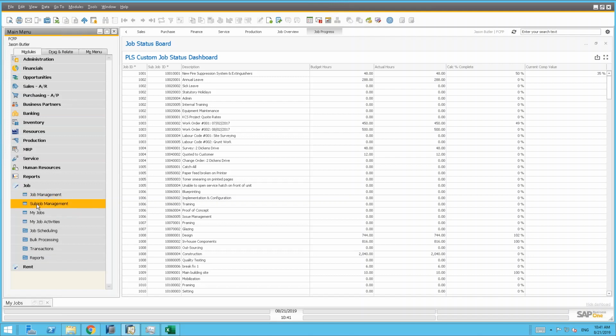So when you're putting estimate lines into a job, that quote that we just uploaded into a job, there was actually a job number created and one sub-job automatically. And the quote lines go into the sub-job. They're all rolled up into the job. So if you've got a number of phases on a job or a number of work orders on a job, they'll all roll up into one big job master. We'll see that right away.